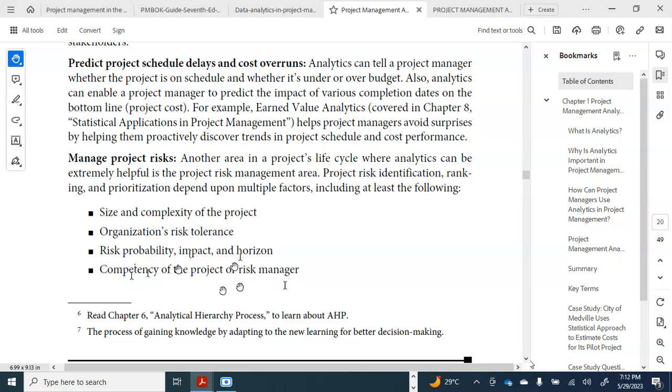Now, you agree with me that in your projects as scheduled, there are risks in that project. Like let's take for instance your procurement. If you don't procure your material early enough, procurement normally takes time. It will affect your program of work. It will affect what you have planned. If, for instance, you say, okay, procurement, we are giving procurement 2 weeks. And we've already set it that we started today, which is about 5 of May